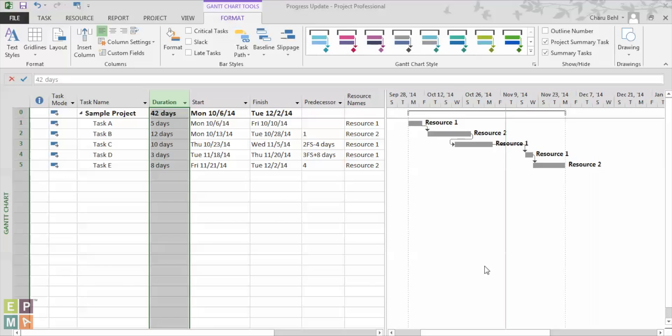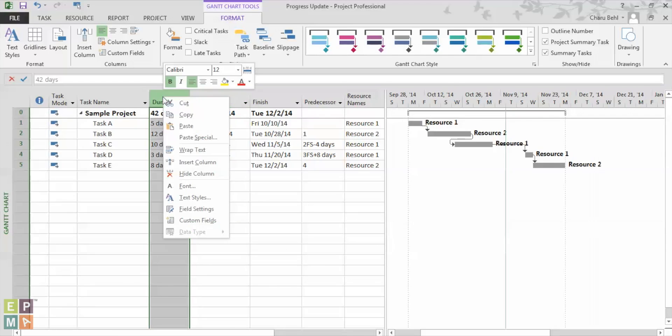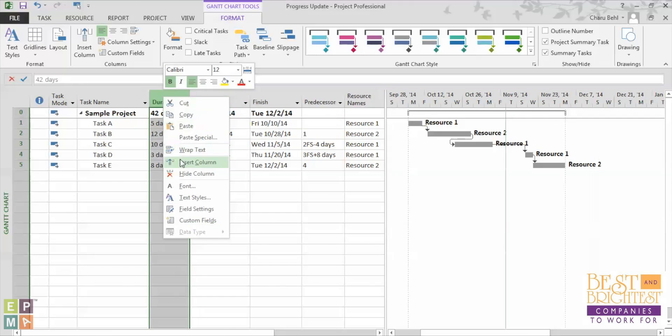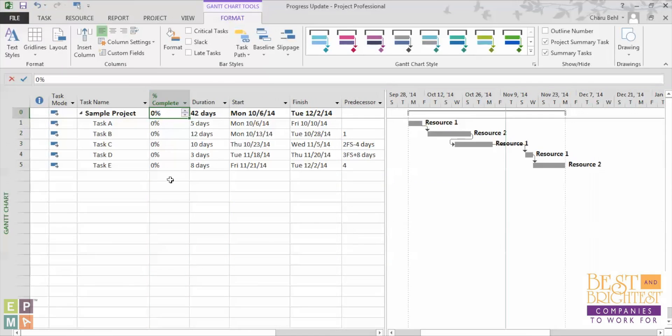Now the very first method I'm going to explain is called the percent complete method. It is an estimated ratio of actual work performed versus total amount of work to be completed. Now to do that the very first step that I would do is I would right click and insert a column called percent complete column.